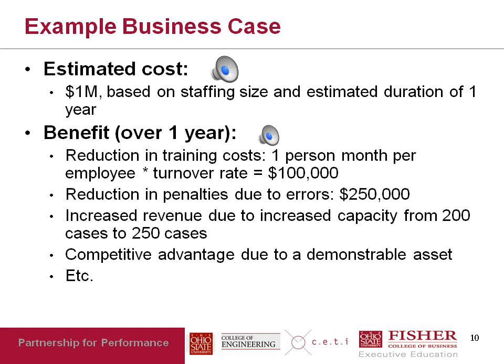These folks will have to be full-time for the first year, so you have 5 people full-time. Each of them would probably be costing, say, $100,000 a year. So that would make it $500,000.